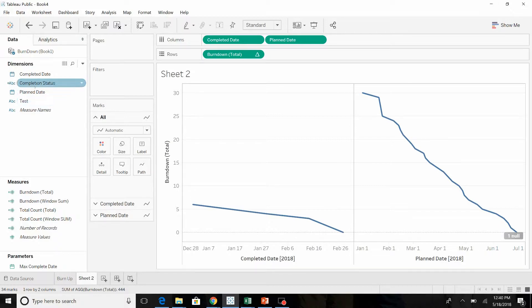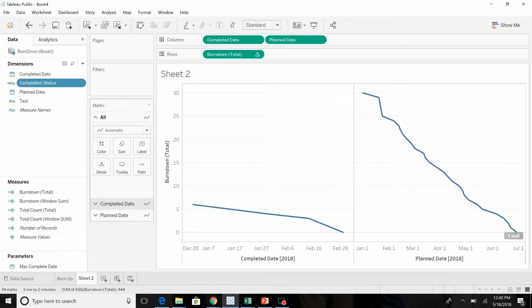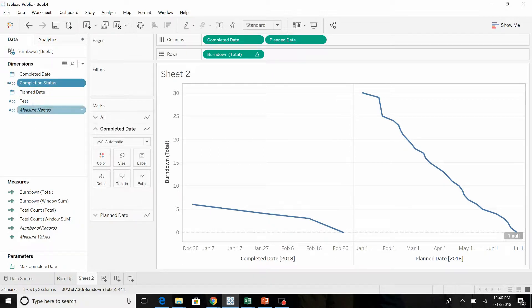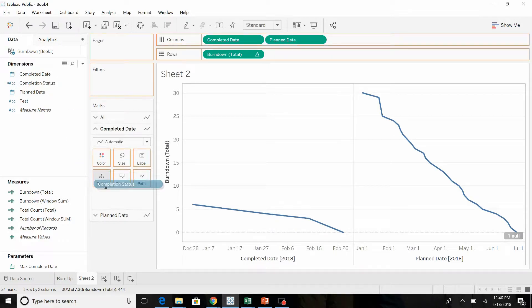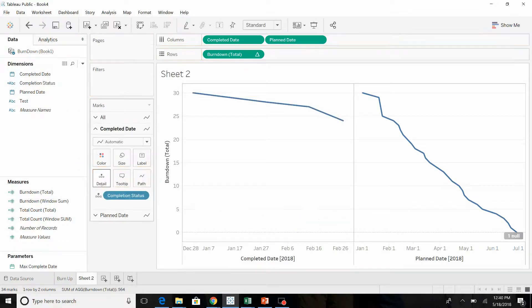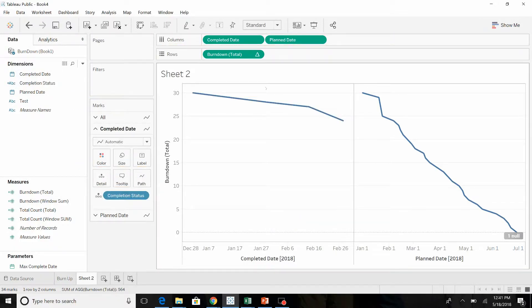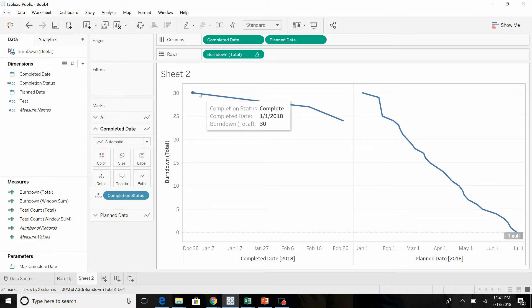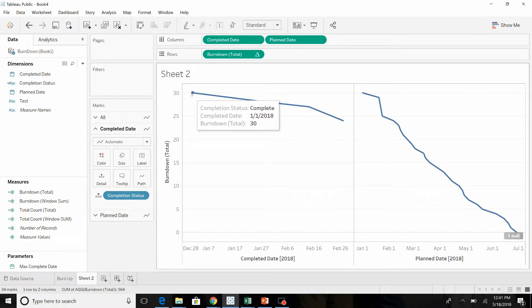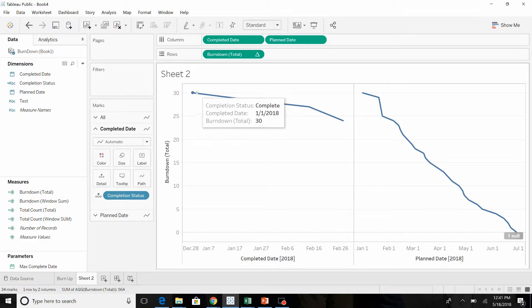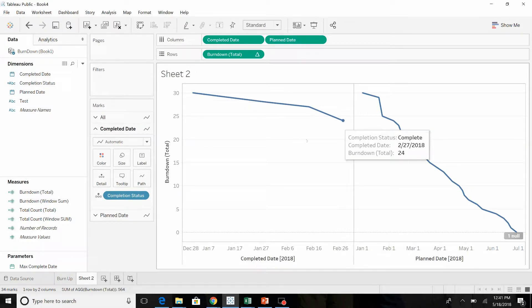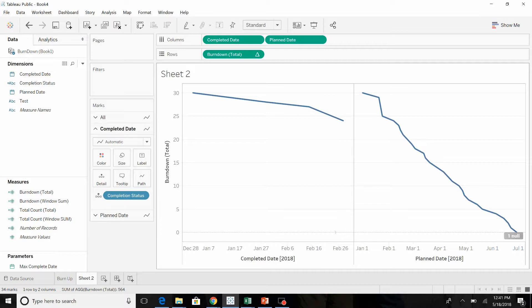So the way we get around that is we add the completion status to the completed date. Once again, it's taking the total value for all 31 tests and then subtracting out the completed projects. The ones that are still open are showing up as null and aren't showing up on this chart.